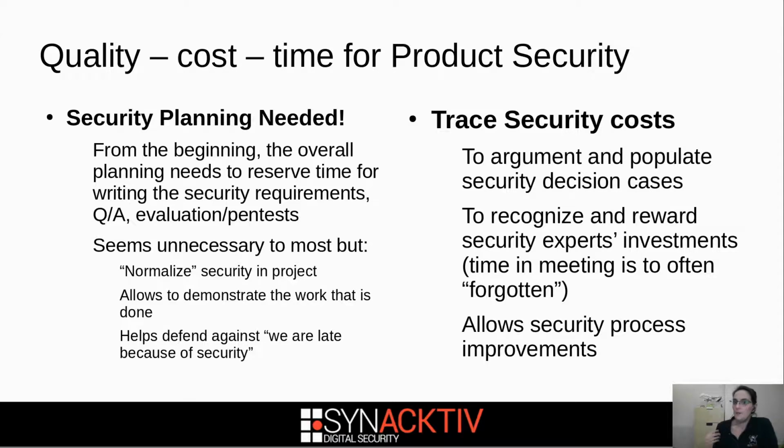It's also to recognize and reward security expert investment, again, the time in meetings, and it's going to allow you to improve your process from time to time. If you've reserved, I don't know, 2 weeks to write security requirements, and actually it's taken 4 weeks, well, you know it. Next time you do better, you're going to write 4 weeks into the planning.